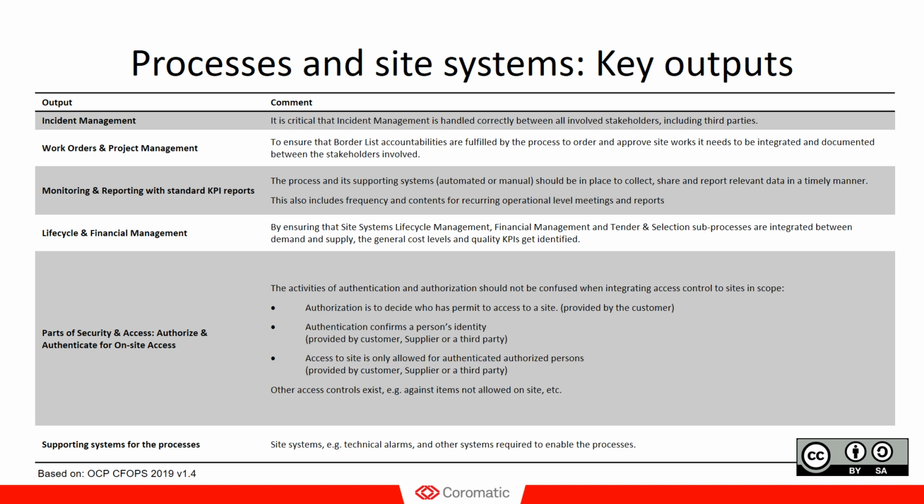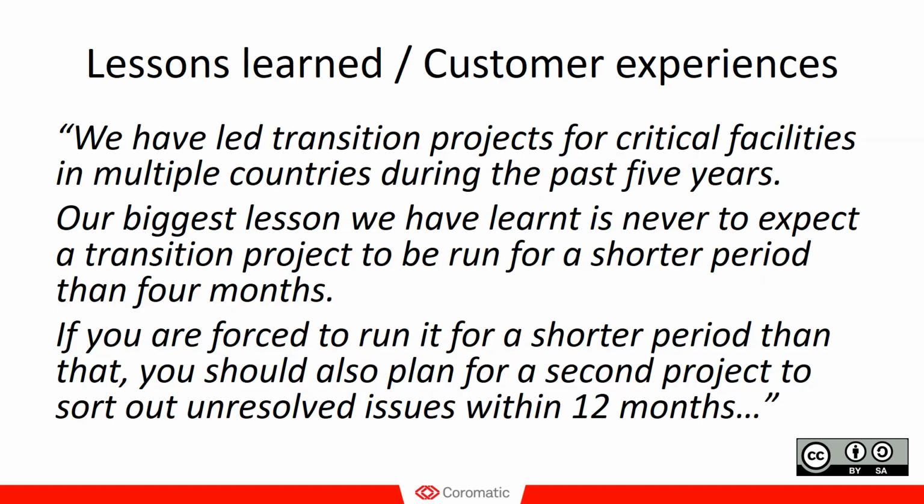Some lessons learned then. Well, the advisory experts of Chromatic have led transition projects for the past 5 years when this is recorded, in several countries. And their biggest lesson learned from these transitions is never to expect a transition project to be run for a shorter period than 4 months.